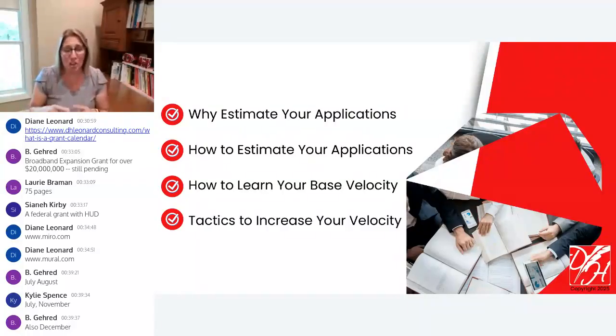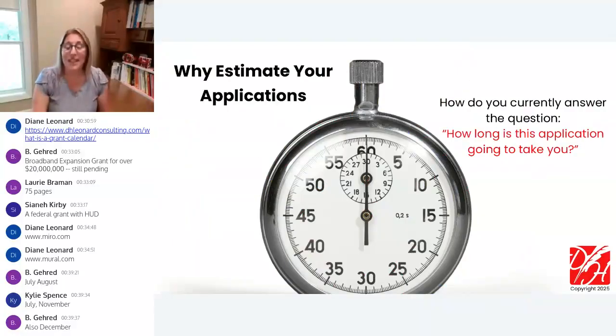But in the long list, they had signing grant agreements, single list. They had state grants, single line in the list. They had a letter of inquiry that was 250 words, single item on the list. Those don't all sound the same, do they, in terms of our overall effort? They don't. Yet they were represented. So what they were thinking was, well, I have a spreadsheet that has 121 items on it. Yes, those are important. Like that's a good output to know.